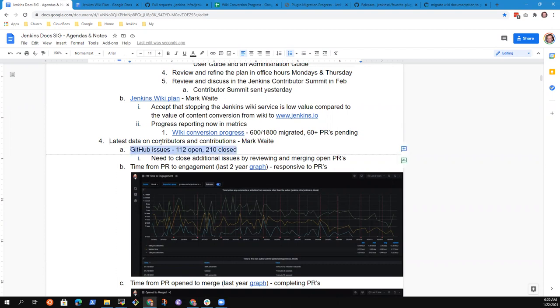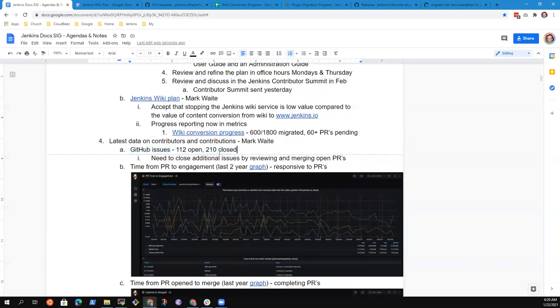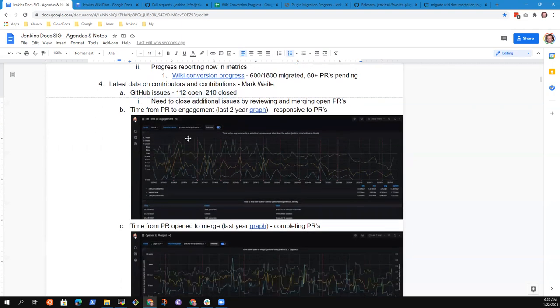Now latest data on contributors and contributions. We've got 112 open GitHub issues. That's down seven from the number of open issues that were open as of last month. So we're moving slowly towards reducing those open issues. Many of those issues are transformation from wiki to Jenkins.io and their work that needs to be done. There are many more that could be created.